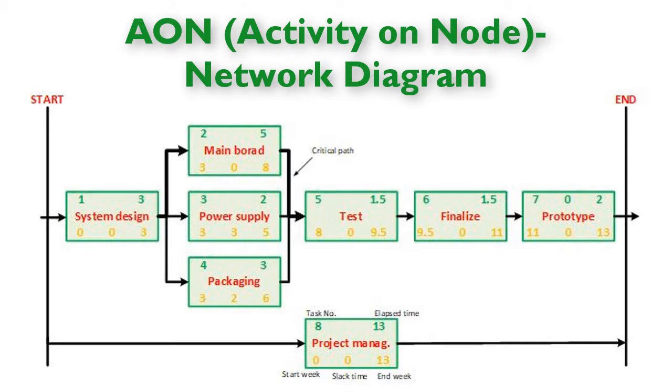Critical path, a sequence of tasks that need to be executed and determine the duration of the project, is named critical path. This path is presented in the diagram with a thick line. Variable time, loose time. Variable time is calculated at the end of network diagram construction. It presents how much time we have left for a certain task without shortening the duration of the complete project.